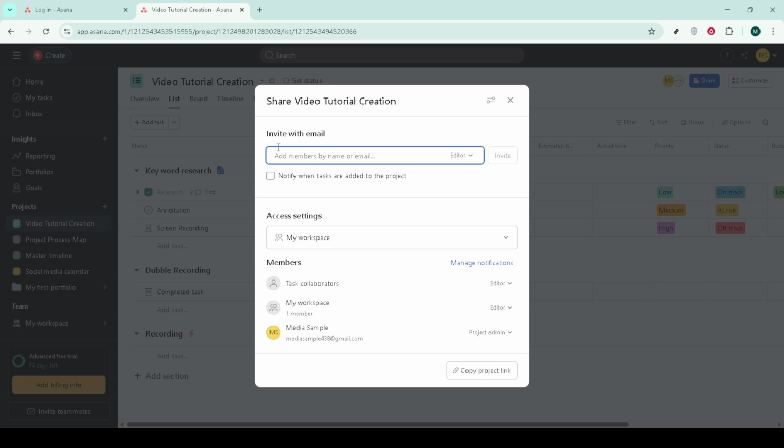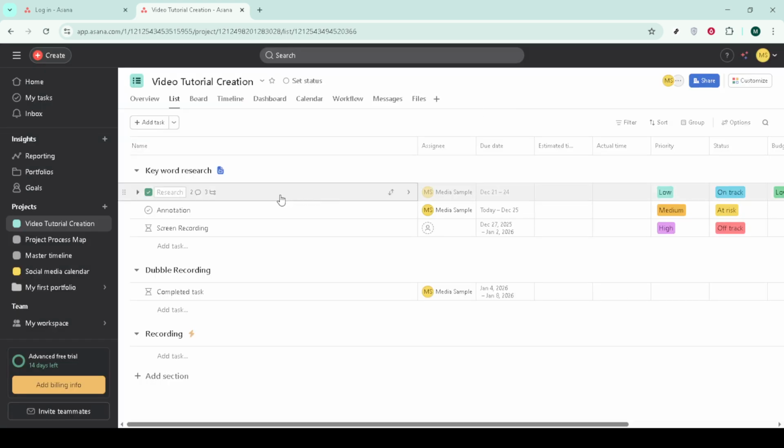Now brainstorm everything involved. List tasks, decisions, inputs, outputs, and who is responsible for each. Don't worry about order yet. Aim for completeness. Action items should read like verbs, and outputs should describe the tangible result.